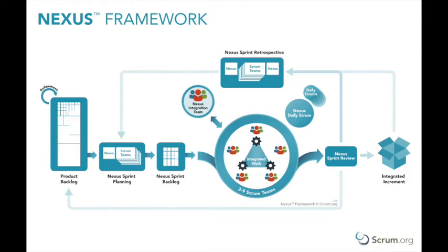These dependencies are related to: first, requirements. The scope of the requirements may overlap, and the manner in which they are implemented may also affect each other. That knowledge should be considered when ordering the product backlog and selecting product backlog items. Second, domain knowledge. The people on the teams have knowledge of various business and computer systems. Their knowledge should be distributed across the Scrum teams to ensure that the teams have the knowledge they need to do their work, to minimize interruptions between Scrum teams during a sprint.